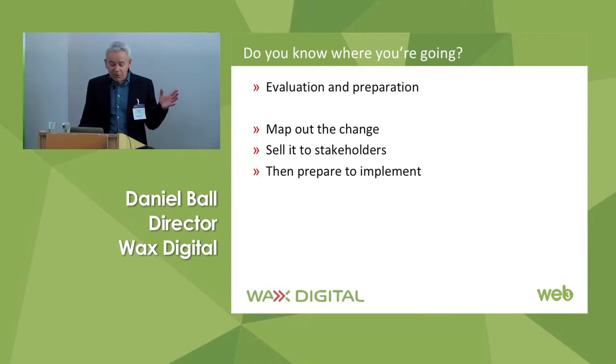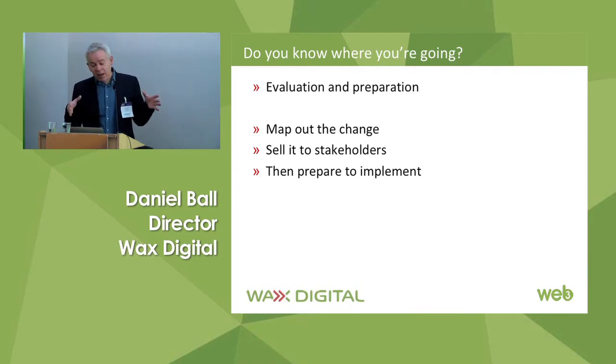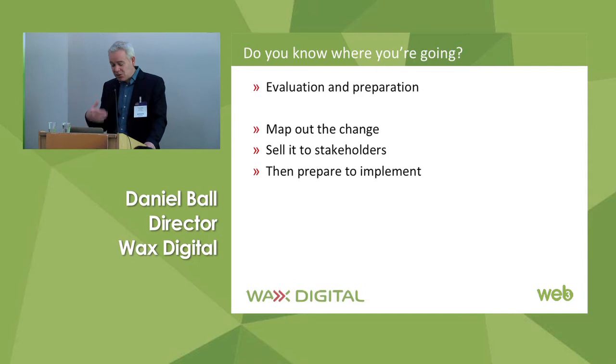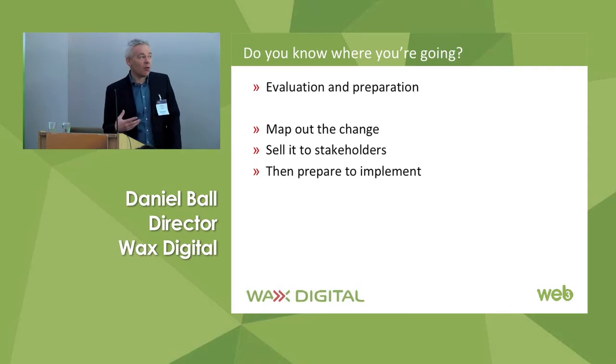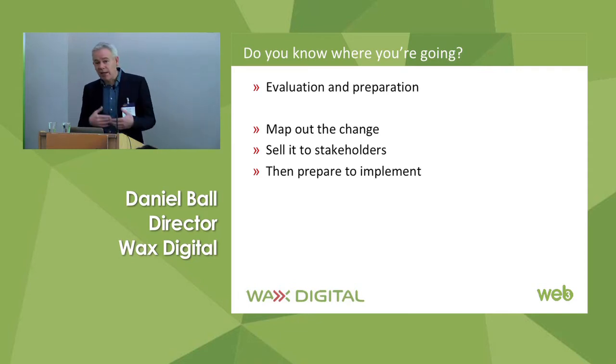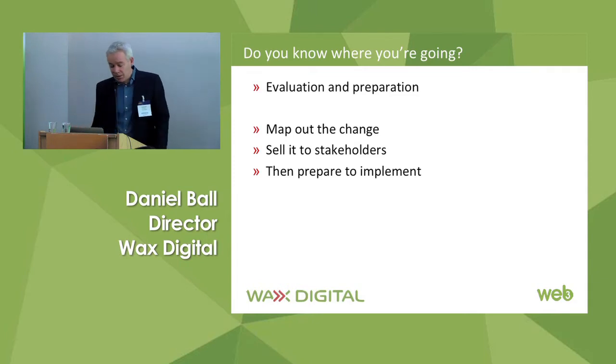A client of ours, Warburton's, did a fantastic job here where they had a small, actually mostly outsourced, procurement function. They insourced that, brought it back in-house, and spent 2 months prior to implementation with a dedicated, experienced project manager laying the project groundwork. As a consequence, it was one of the most successful projects we've ever been involved with, because the client was really well prepared, had put the groundwork, the preparation and the detail in place to start what is a major project.